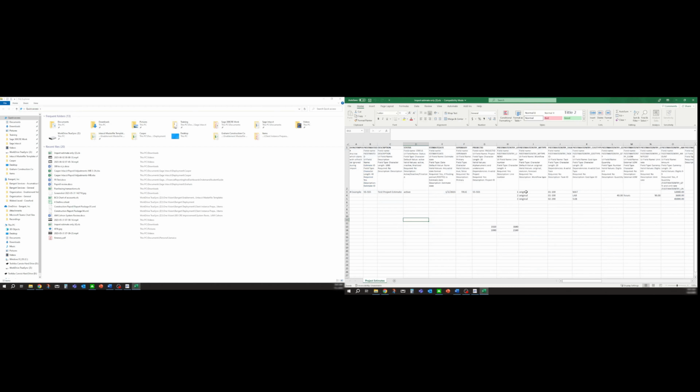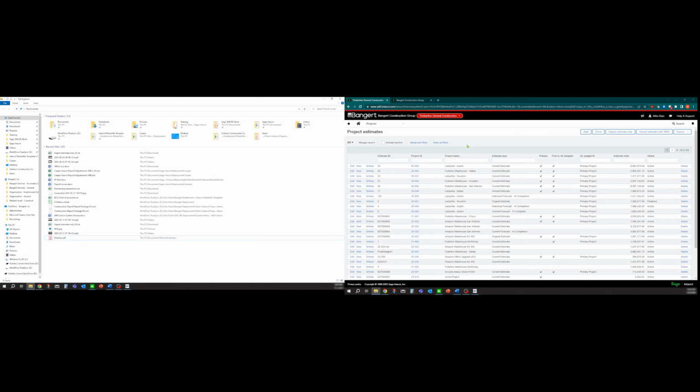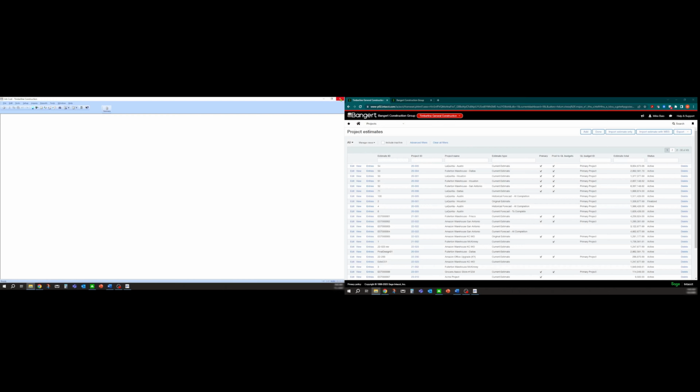And it's just waiting to open up my Excel. There it is. So you can see here that we have some samples that we usually provide, but here's what needs to be for the estimate, the job number, the different cost codes, the different categories, and that can just get imported in an Excel type file. So what we'll show now is how to put one in manually and see the differences between the two as we go from there. So let's close this up and let's get back into Sage 300.